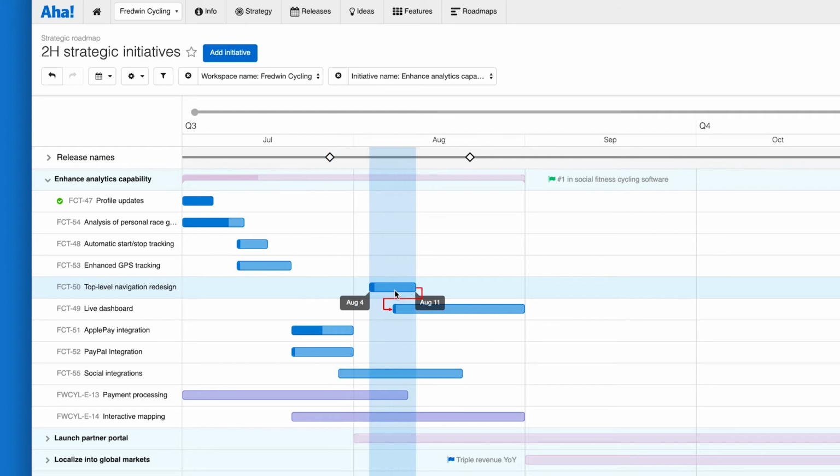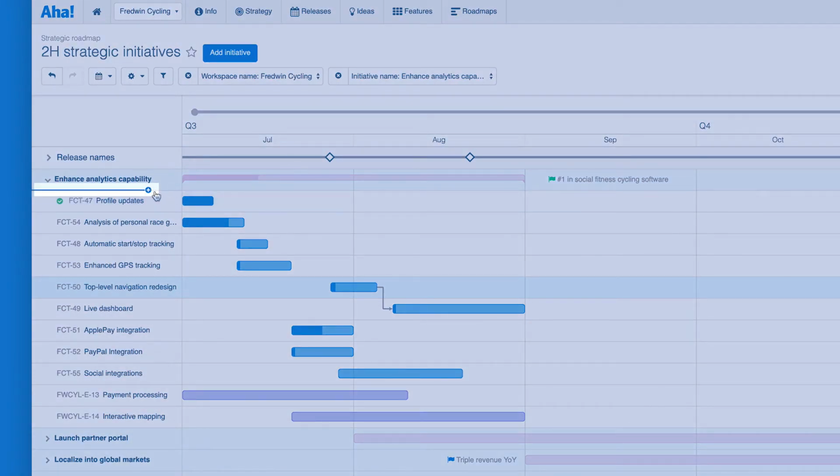All that means is that pushing the dates like this and seeing that conflict, I can, in June right now, address a conflict before it ever comes up in August, which is a really powerful way to use this roadmap, not just for presenting on your plans, but also for actually doing some work and adjusting those plans to be realistic so you can meet those strategic goals. Okay, last thing I'll show you here is you can click these blue pluses to show any features or any record types that you've hidden from the roadmap.